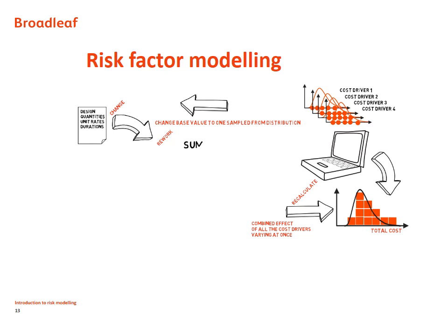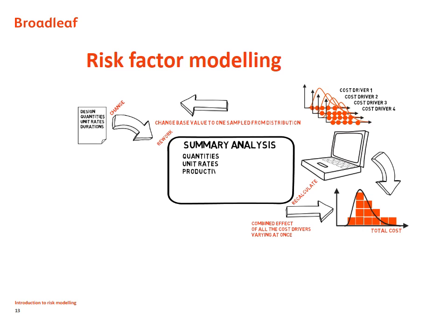As with a quick what-if analysis, we don't need to use a large complicated estimate to carry out this sort of analysis. We can do it with a summary of the estimate, so long as the summary allows us to apply the cost drivers to the parts of the costs they will affect. Things like material costs, labour costs, overheads, major lump sum purchases, and so on. And all of this can be carried out in a model built in Excel using something like the @Risk add-in.